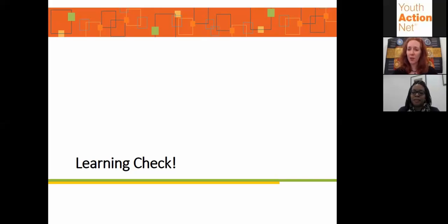So just pick the few that are going to be the most useful and give yourself some set boundaries on how much time you're going to spend in the planning phase before you actually jump in and start doing the work. And then remember that you don't have to have every detail perfectly. You do want to try to think through all of the major elements, but then once you get into the implementation, that's where you actually go back to your planning documents and you want to keep using them as living documents so that you can refine and update as needed.